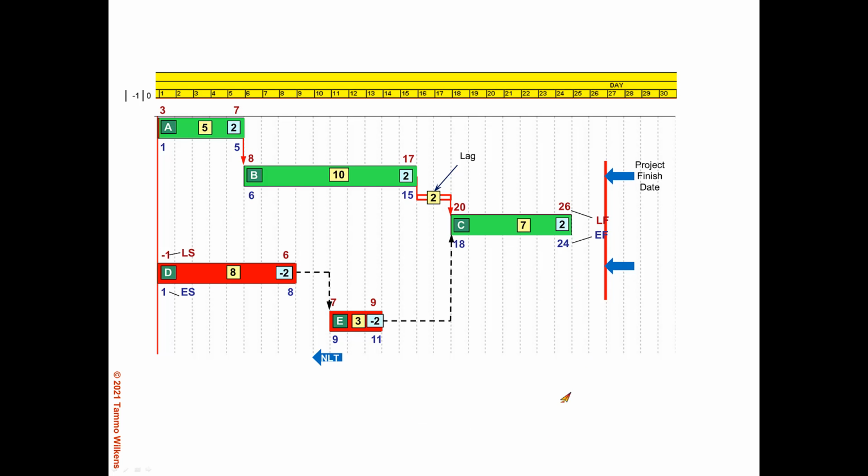So I hope that's been helpful. And as a slight footnote or epilogue, on every project that I have managed, we never had negative float unless it was due to conditions and lack of progress, etc. But from a planning standpoint, the longest path always had positive float, because I always ask the project team to come up with a plan that ends before the due date that we owed to the customer. And so our longest path always had positive float and I've never managed a project that came in late. So if you manage your float appropriately, you can get your project done.